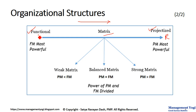In a functional organization, the functional manager is most powerful. The project manager role may not exist, or if it does it will be a part-time role with much less authority than the functional manager. Whereas in a projectized organization, the project manager is most powerful, and the functional manager role, if it exists, has much less authority compared to the project manager.